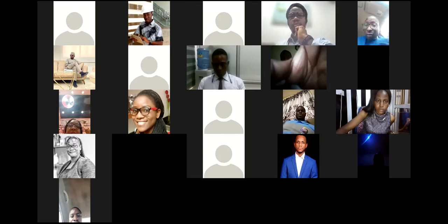They're preparing for testing, commissioning, and handover. They've done the first phase of the post-construction cleaning, but they're still to do the final one for them to occupy. We're hoping that by next week, even if they haven't, we have agreed with them that we'll move in to start our asset register. Very good. And we're 3 of us on that project.